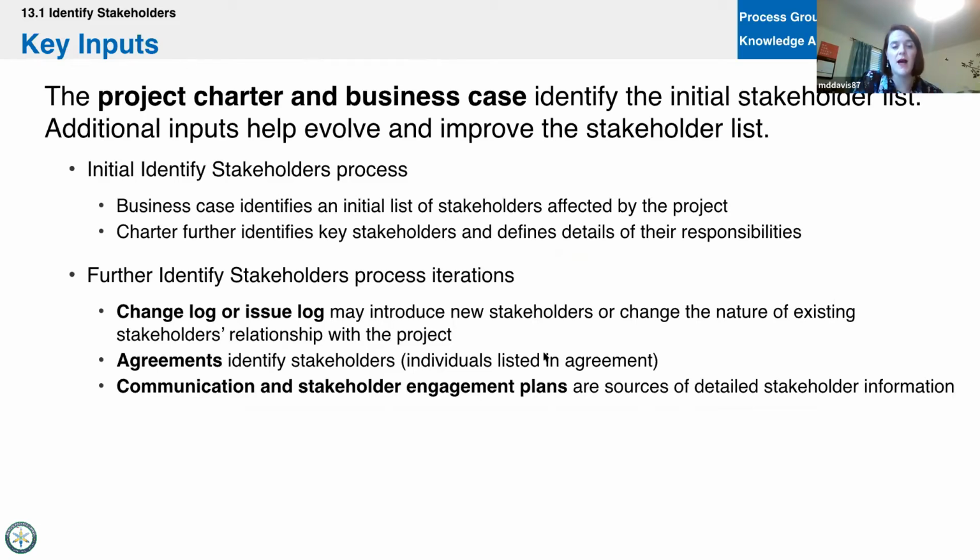So I'll give you an example. The hospital full-scale exercise that I worked on two years ago, and we're probably going to get the project again this year. The regulation, so the environmental factors, changed, so there are more healthcare facilities that are required to do this type of drill. So at the end, a lot of potential stakeholders came in wanting to join the overall project drill. And so it's trying to moderate which stakeholders, is it possible to integrate them at the end? Is that changing the scope of the project too much? Because the project started initially as just 15 hospitals, and then they suddenly wanted to add 15 hospitals, 5 health departments, and 17 ambulatory surgical centers.